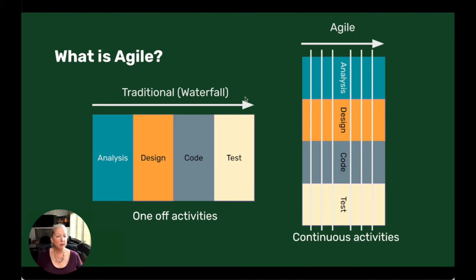So what I'm going to do is ask, what's the smallest piece of software we can develop that brings the highest level of value to the customer? I'm going to write up the requirements, do the designs, code it, test it, and say, hey, after a time period, here's the first piece of the software. Product owner, the person who requested the software, stakeholders, what do you think? What's the feedback on this?